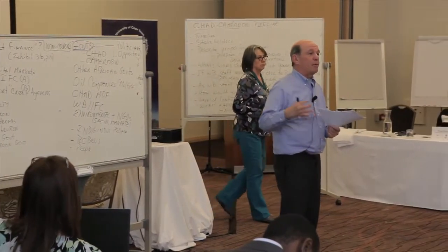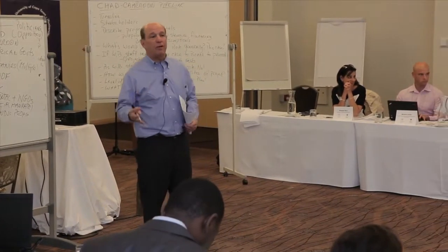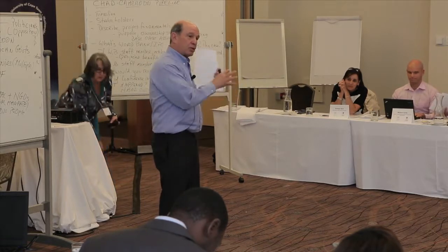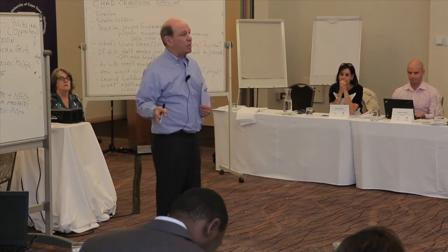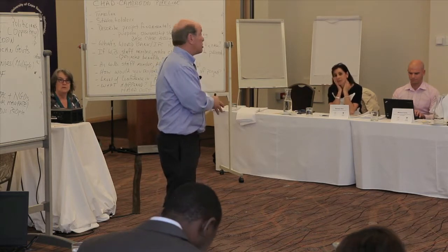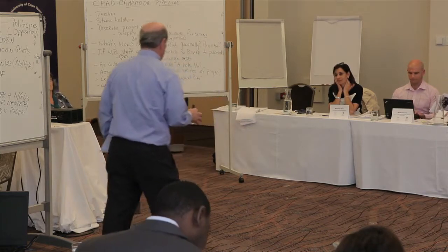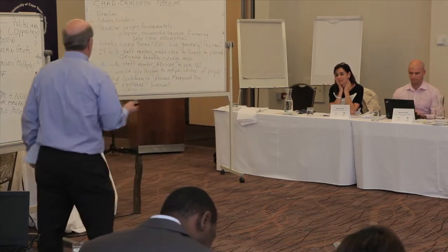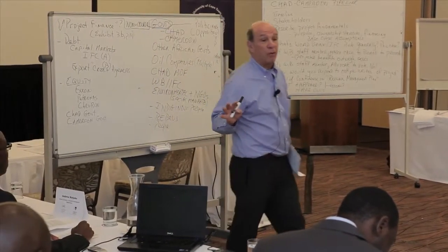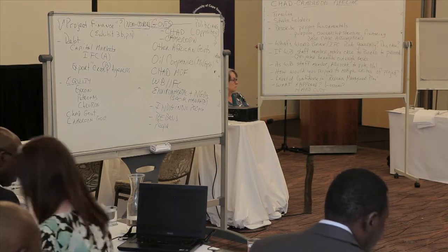Well, basically, when we talk about project finance, we mean that the revenue from that particular project is discrete, and the revenue from that project is used to pay back the lenders and everyone else. And if you do not have recourse as a lender, for example, to the parent company. So let's just say this was, rather than a consortium of oil companies, let's assume just Exxon. Just one company.